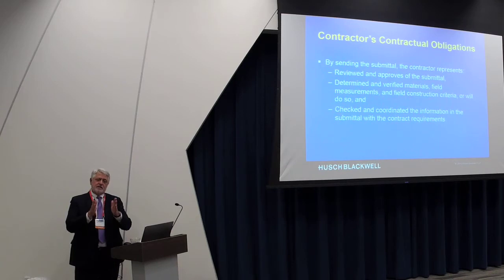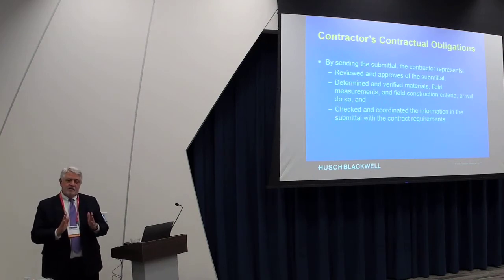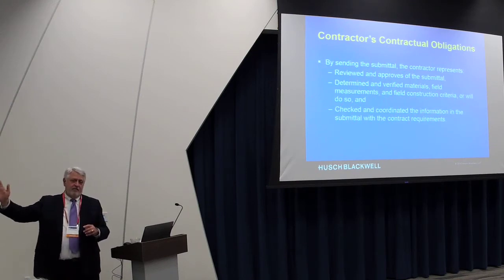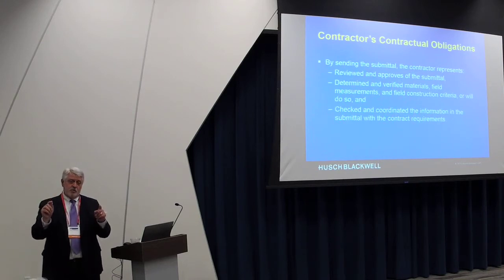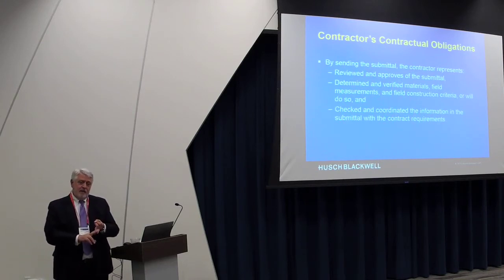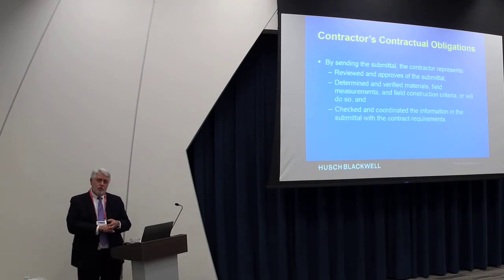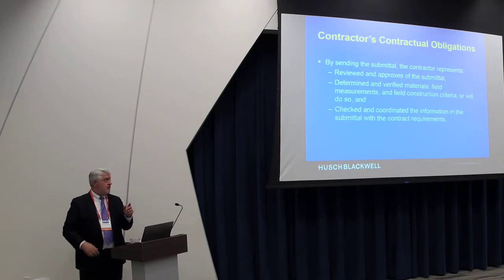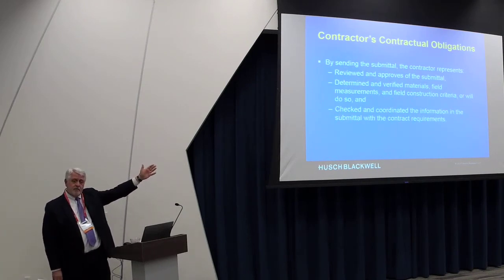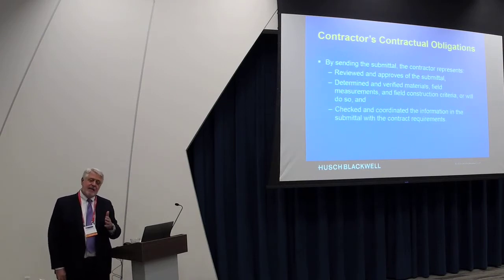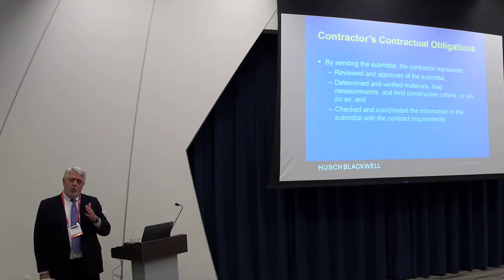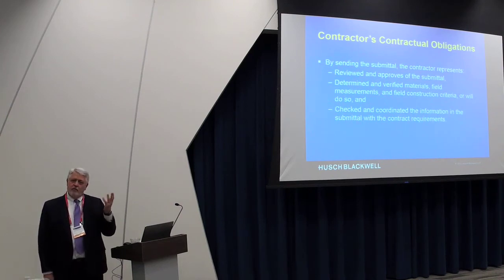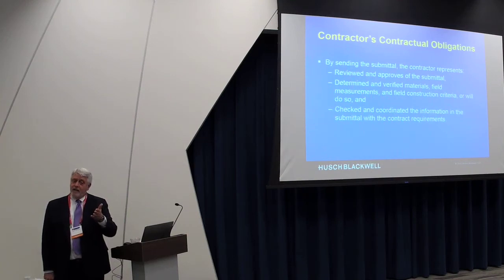Okay, let's limit this to shop drawings. So we've got submittals that we're talking about. Absolutely. And in that instance, you do have some leverage because the contract says they can't do the work until they have an approved shop drawing, if a shop drawing is required for that scope of work. The contract requires the contractor to approve the shop drawings. So if he sends you a shop drawing and he hasn't approved it, what are you doing when you say, yeah, it's okay, even though he didn't approve it and you're required to under the contract? Now you're putting your client at risk, i.e., you're putting yourself at risk.